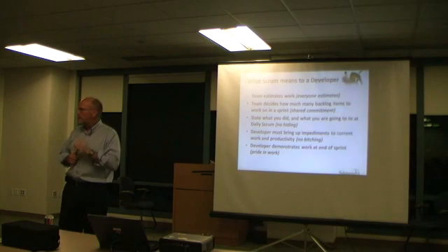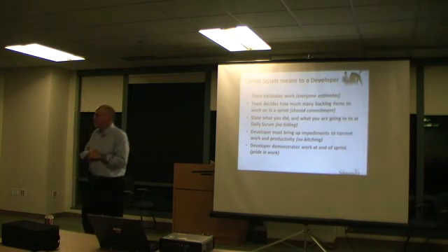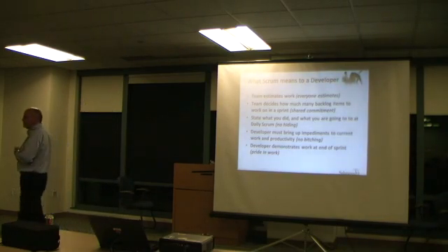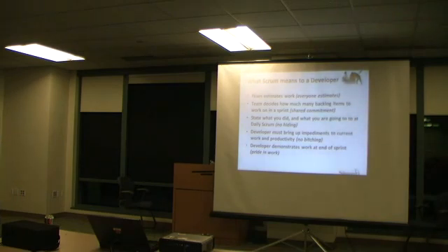I do want to point out, though, you probably shouldn't have tasks that are about 5 days long. We generally try and do our estimation. We use the point system. It's either like short, small, medium, large. And for the large tasks, okay, we know they're going to take time, but usually even for those, we'll have smaller tasks that break it down into smaller pieces, scoping, stuff like that. But you really shouldn't be having tasks that are a week or a week and a half long. It just comes only 2 or 3 weeks.